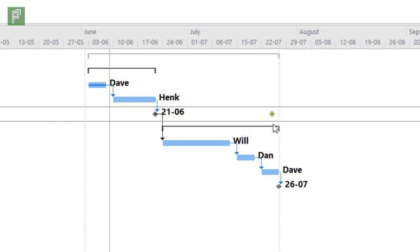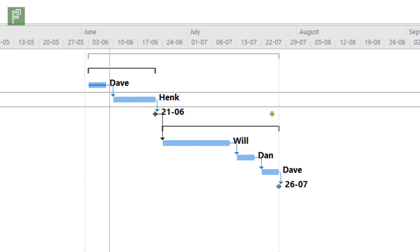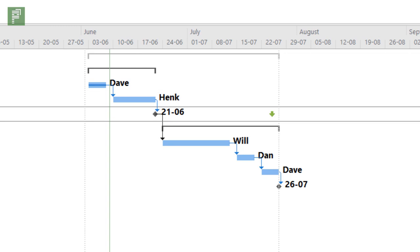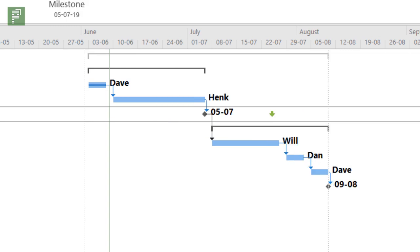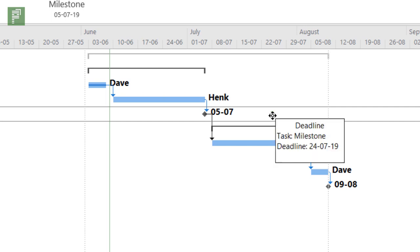If there's changes within the schedules, for instance the one that I showed earlier, everything moves except for that deadline. That deadline is still on the 24th of July. So if you hover over it, it will give you the idea that this is a deadline, the 24th of July 2019, and we're still going to reach that. There's no issue here.